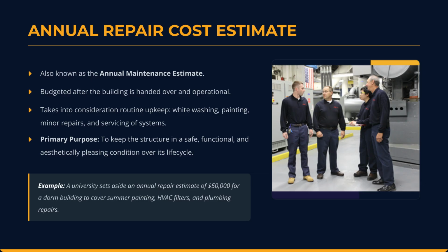Finally, we have the annual repair cost estimate. Construction doesn't end when the keys are handed over. We must budget for routine upkeep, like painting, minor repairs, and HVAC servicing. The goal here is to ensure the structure remains safe and fully functional for its entire lifecycle.